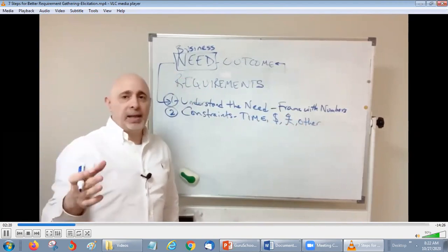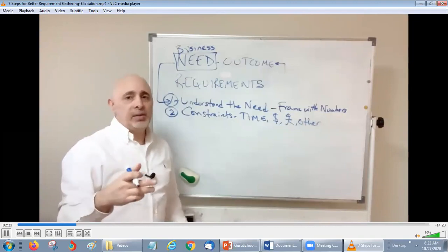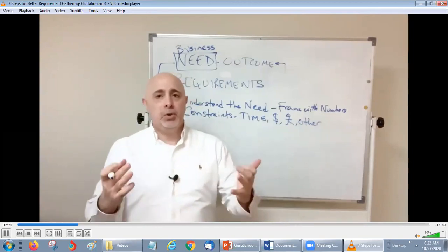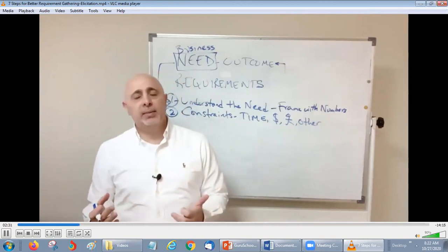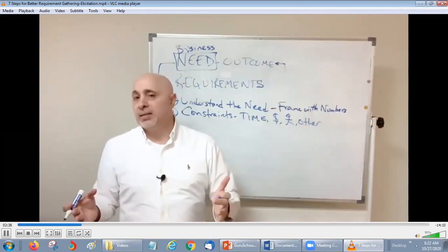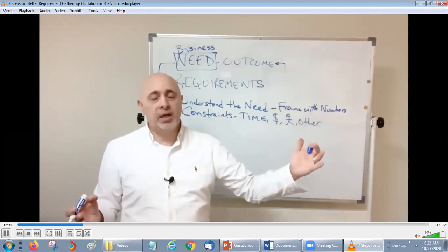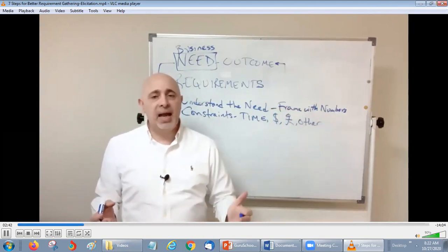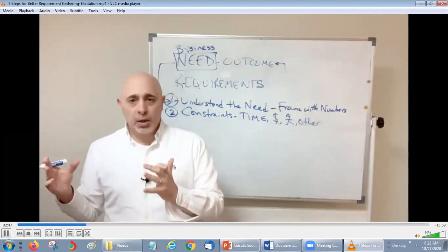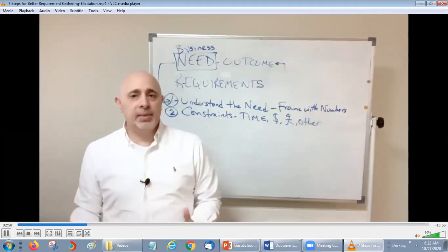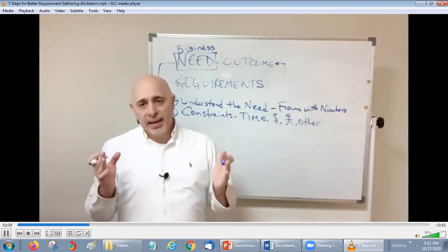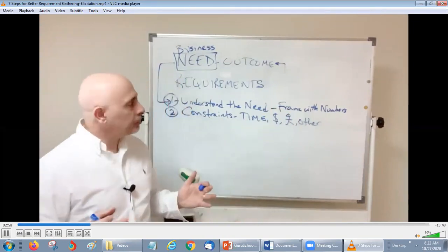And you're going to put a plan to deliver within that time frame or within that budget. So basically, if I have a critical need and I'm coming to you, you're the business analyst, and I'm asking you to get something done that we're looking to roll out in 3 months, then your business analysis process definitely can't take 3 months. You'll probably want to take about a month, month and a half, because you have to consider there's an implementation process. Somebody's got to code this, and then build the system, and then test it. So you have a very limited time frame to work with, and you need to understand it.